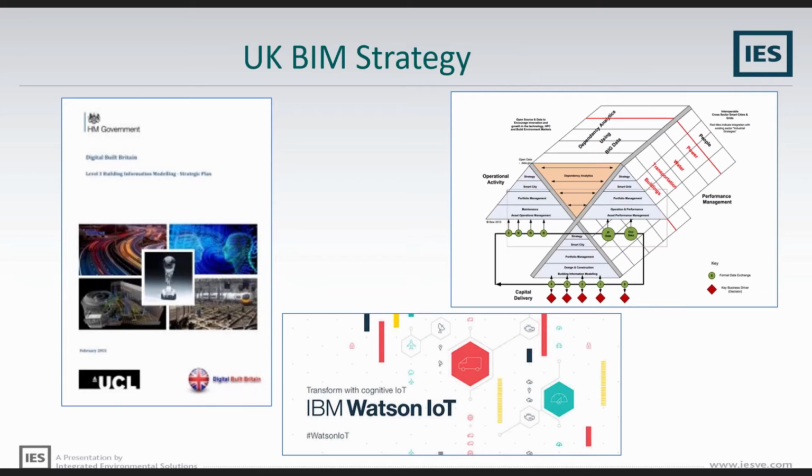According to the BIM UK Task Group, BIM on average saves around 20% on construction costs, and then the cost benefits upstream are obviously much, much more. BIM was recognised to be a useful part of the strategy because it's a vehicle to create and capture information during design for use during construction, commissioning and operation. So we start off the process defining information requirements. We track the development of that information throughout design and construction, and eventually hand over useful, relevant information with the building at completion. The building owner or manager can then use that information to effectively manage their facility.